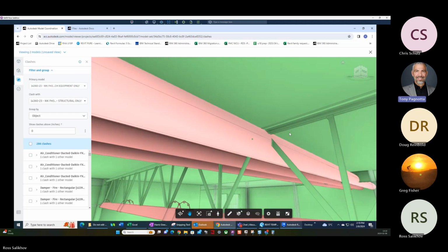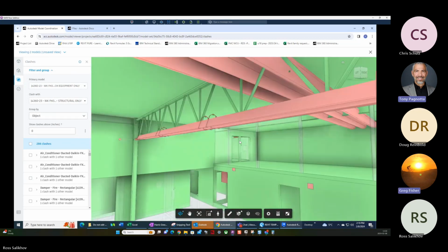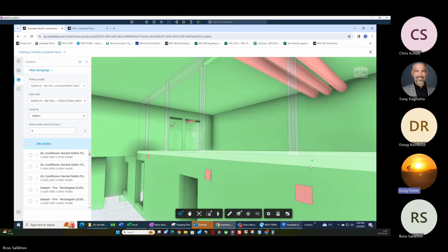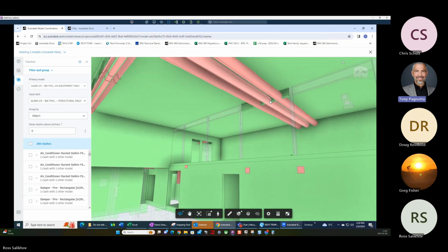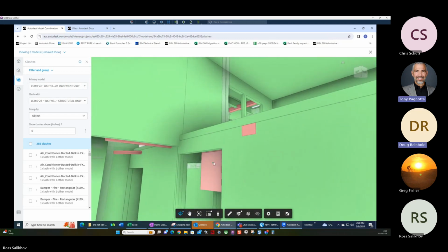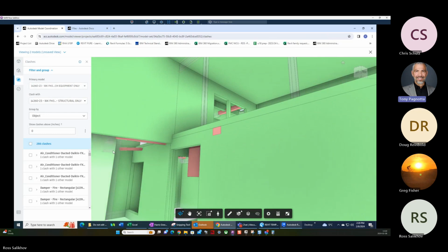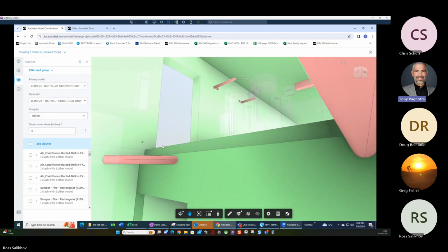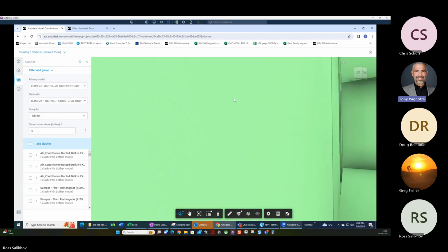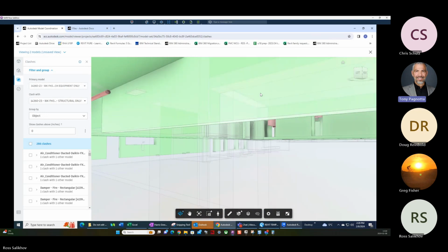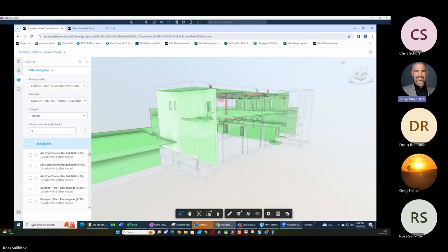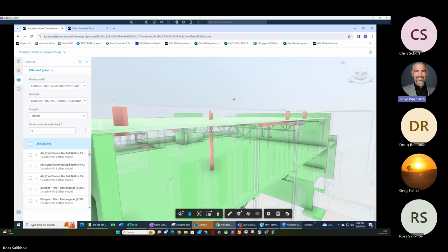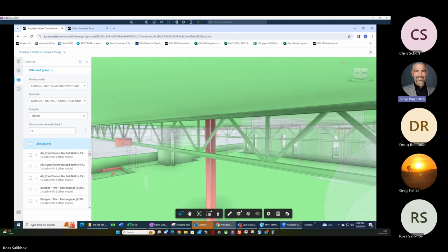Well, what we see in the model, unless we had people dedicated to doing that, right? We would just be coordinating. Yeah. But people are selling the service now, is my point. Understood. Because of this exact issue, like, look at what we've done here. We drew our mechanical drawings, the structural engineer did their drawings, and we all submitted at the exact same time. So no wonder there's 1,000 clashes, right? We didn't get to see their drawings until we submitted our drawings. So now we've got their model and we have to go back and redo our work because of the design process.